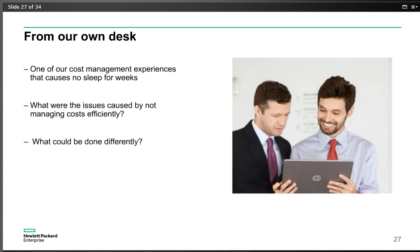Obviously this was a big issue for the particular business unit person, but the fact that it's going to increase the overall budget and resource, and the visibility into that, helped to be able to go back and say, okay, if we do all these projects that have been approved for IT for next year, and also do this particular project that you're requesting, this is the impact from a portfolio perspective. And that's something that we definitely see customers